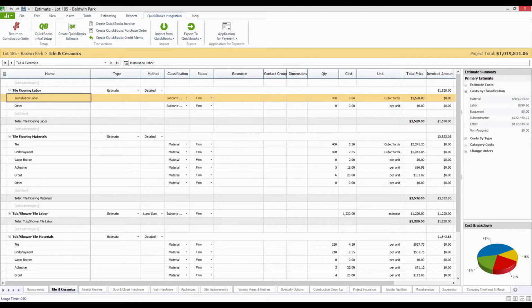So you can build your estimates out, and then you can choose to go under File and Save As, and save it as a template. From there, you're going to be able to pick out which information that you scrub from the estimate, like your costs or your quantities that are coming through. But yeah, you can actually build any number of templates for your different jobs or project types and be able to generate estimates directly into those quickly and easily.